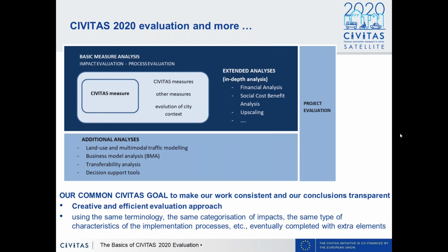What I would do is make yourself a first basic list of what you think is important, taking into account mainly the objectives of the measures and your project, and provide this information to the different stakeholders, saying, this is what we think, but taking into account your concerns.